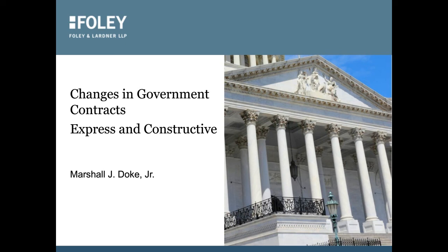And the government pays interest on the amount of that claim that you have made. That's the only time I know that you can get interest on costs that you haven't incurred. But you can do that with claims, and that just tells us as contractors that you should put an estimate in as soon as you can. You can't cheat, but you can be generous in your estimate of what it's going to cost, and you get interest on that, and it starts from the day you submit that claim.